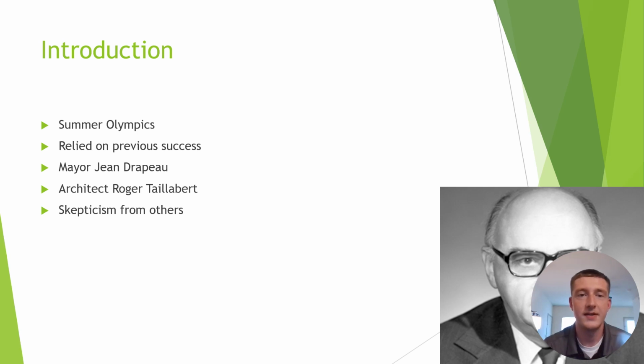In 1976, the Summer Olympics were held in Montreal, Canada. During the summer of 1970, the host site of Montreal was selected. Patel et al. state the Olympic bid was based in part on Montreal's successful hosting of the 1967 Expo. However, the final cost of the Expo was $430 million, much more than the 1964 estimate of $160 million.